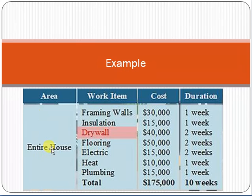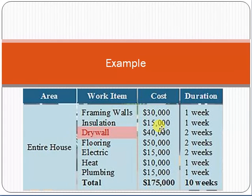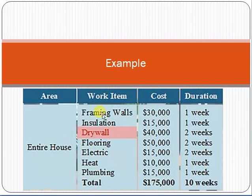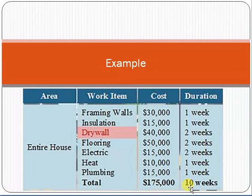Here's a simple example. To build a house, divide the work into components with cost and duration: framing walls — $30,000, one week; insulation — $15,000, one week; drywall — $40,000, two weeks; flooring — $50,000, two weeks; electrical — $15,000, two weeks; heat — $10,000, one week; plumbing — $15,000, one week. Summing up all these gives a total cost of $175,000 and a total duration of 10 weeks.